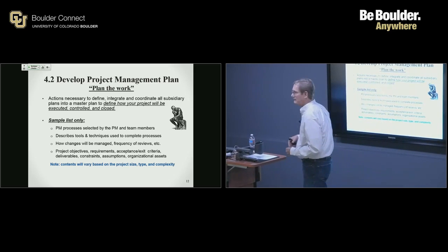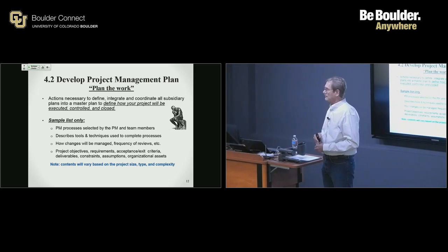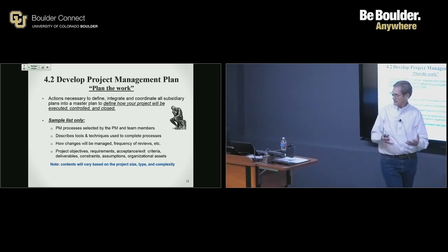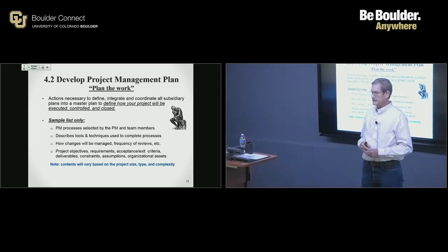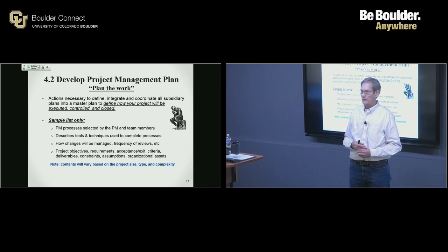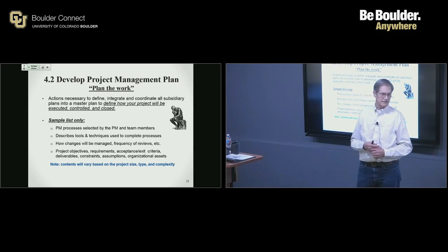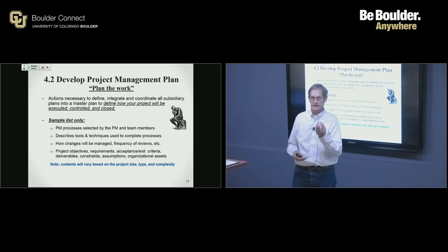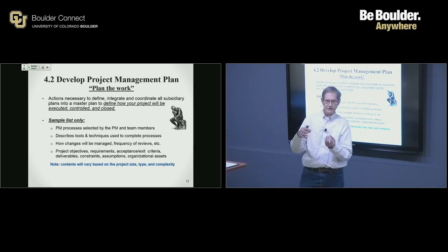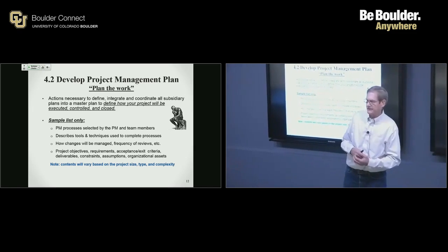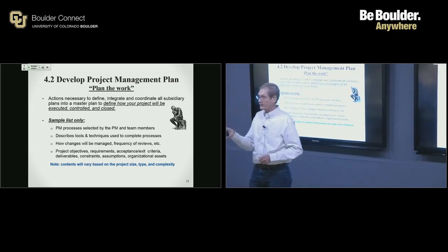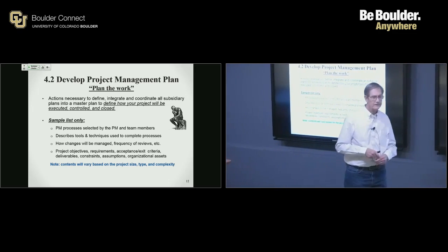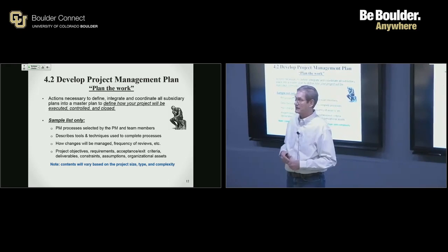Yes, sir. Patrick? I guess like a team list and like proposed roles, I guess. Yeah, like a resource management, a list of people with the skills. We call it a resource assignment matrix, or a RAM. We'll talk more about that during, I think, Chapter 9. So a staffing plan, in round numbers. Who do we need? Do we need volunteers? What kind of skills are needed? When are they needed? So a staffing plan, a scope management plan, a schedule, a budget. Those are all what we often refer to as subsidiary documents or plan documents that would be part of